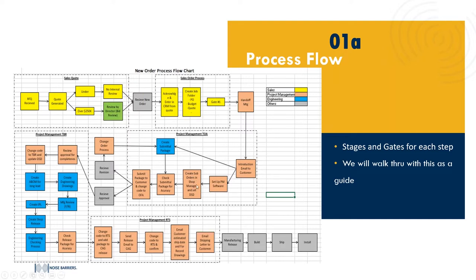Once the project manager understands the scope, an email is sent to the customer letting them know who their project manager is and when drawings can be expected. We set up the order in our project management software to track it, and we split the order in our shop manager tool into multiple sub-orders — panels, structural steel, install, and freight — so those items can move and flow at their own pace throughout our shop rather than being one clunky large dollar amount. If materials need to be ordered sooner, we can procure them sooner.